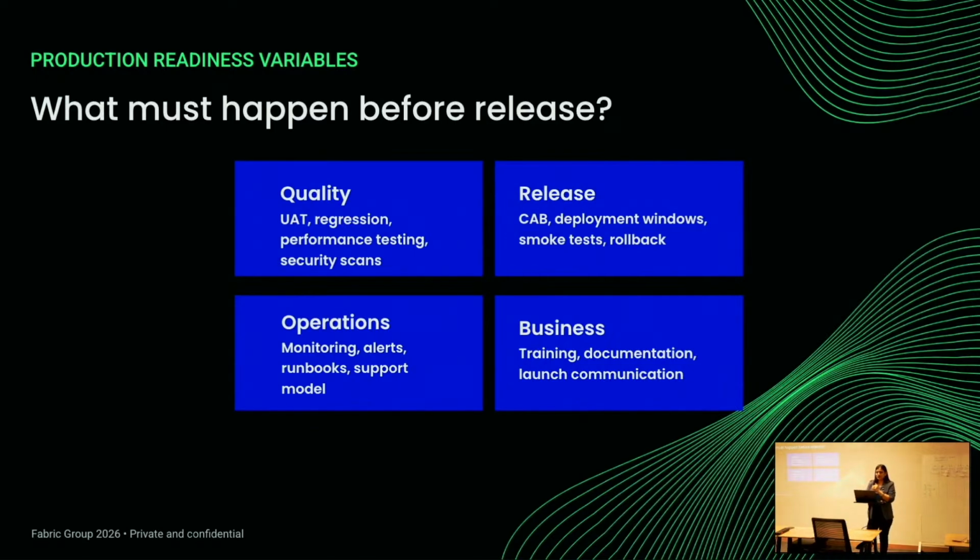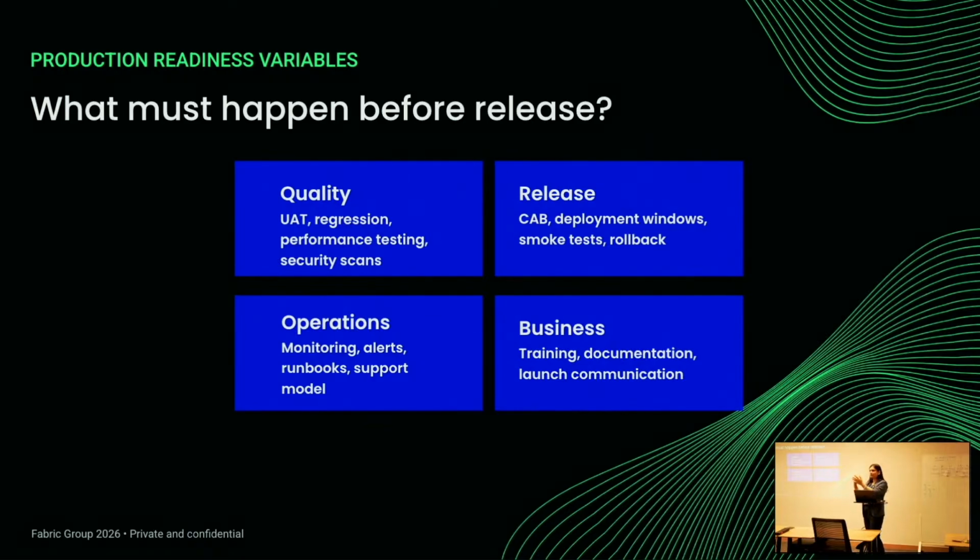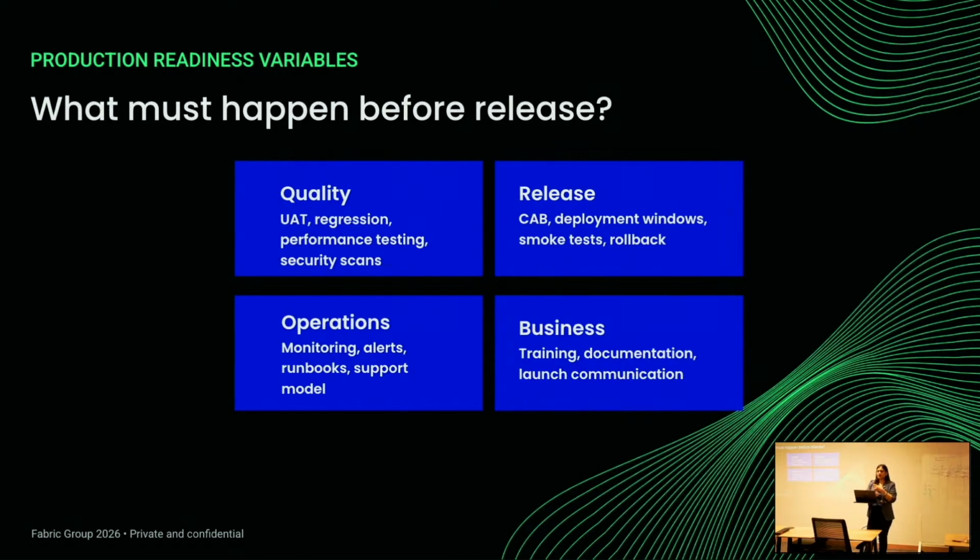Okay, cool. So what I deem as a very critical set of factors is, how do you ensure that your quality is right? So whether you're doing the right user acceptance testing. I think there are a lot of QE engineers here in the room, right? So you know that it's so important to get your actual users, give them a staging environment which replicates your prod before you go live. Test it, get the feedback, fix whatever is broken or what they think is missing in the system, and then go live with it, right? So quality has a lot of aspects to it. UAT is one, getting a regression suite built is another, to verify all your flows are working, stuff like that.